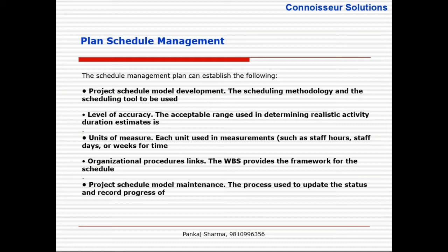Yeah. Now activity. And then 8 by 80 was only for suppliers, not for everyone, right? 8 by 80 was meant for work packages for suppliers. But when the work packages of suppliers are further decomposed into granular activities, make the activities so granular that, at the end of the day when you have to track the status, corresponding to every activity there should be only two statuses: done or not done. No 75%, 35%, 40%.